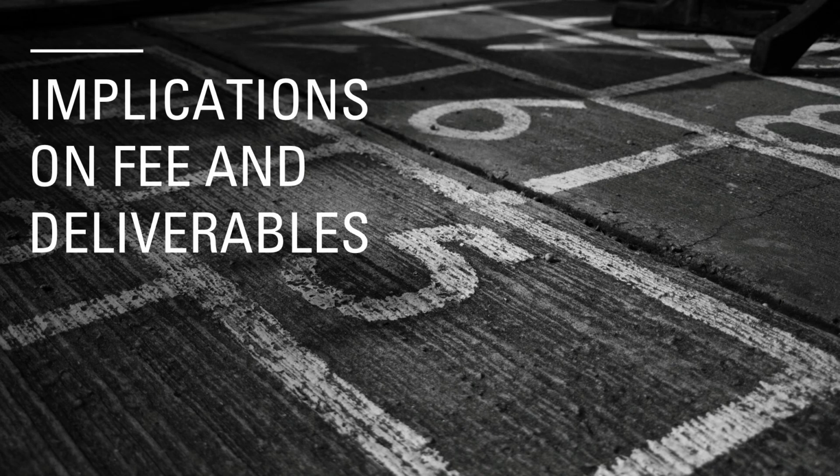First, fee and deliverables. BIM doesn't automatically make projects more expensive, nor does it guarantee savings. While efficiency gains can reduce time and cost, they're often offset by increased expectations and added services that may be promised without additional fees. That's why it's critical for those preparing fee proposals to understand the real effort involved in producing BIM data. Overpromising can strip all profit from a job, especially when leadership doesn't fully grasp the demands placed on those delivering the work.